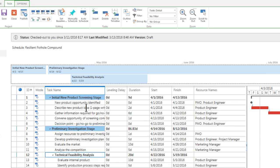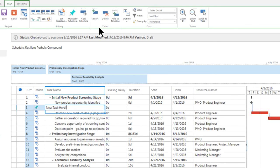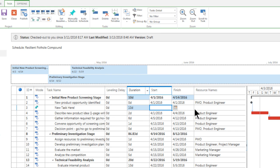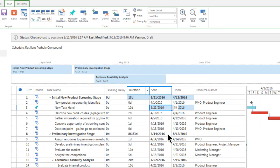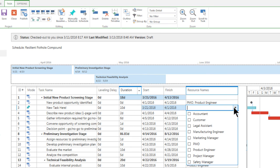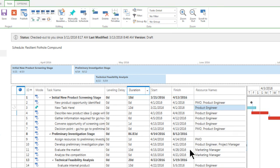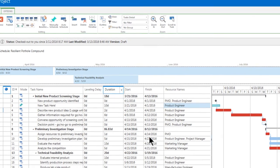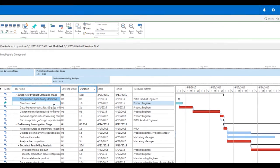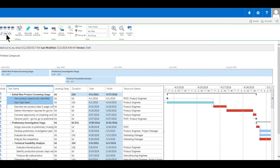The tasks that I've selected are represented in length by duration and their position according to their start date. I can also enter new tasks, and I can name it, enter duration, a start date, and assign resources. I can also set dependencies. I will set a finish to start dependency from the first task, which happens to be a milestone, and our newly created task.